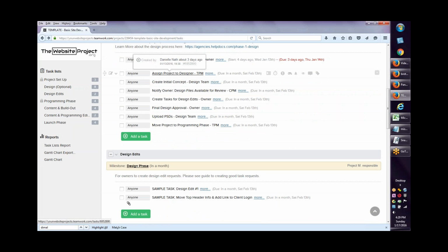then I will assign this task out, and right now Jerome is our main technical project manager who will be assigning these projects out still. So then Jerome will have this task assigned to him, and that's his trigger to decide who's best to do it, and then come in here and actually assign this next task, to create the initial design concept, to the appropriate person on the design team. So here's the difference: as opposed to us assigning things from that Sitology overview list, you'll have an actual task within the project assigned to you.